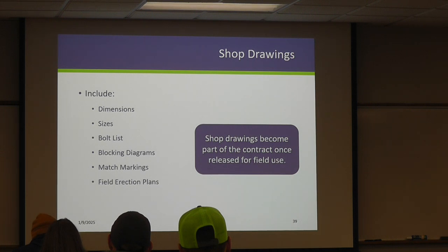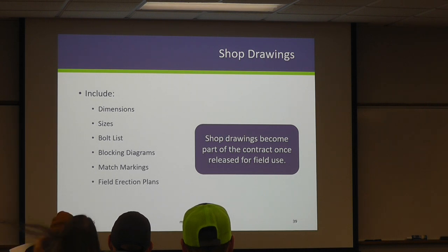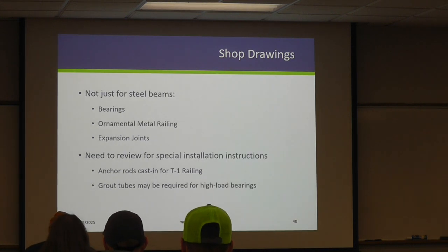So this is a separate document that's produced after the contract has been awarded. But once it's been released, or once it's been accepted into the project, it becomes part of your contract, and you need to incorporate this into field use. So this is something that's going to come later. It's probably the biggest piece.